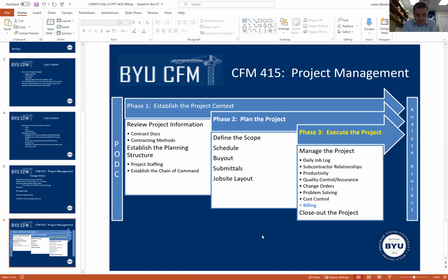if construction ends up shutting down for very long. And so during contract negotiations or your pre-construction meeting, you need to discuss the pay application process with the contractor and architect and the owner. Everybody needs to be involved in that. And so it's important that all three parties understand how that process is going to work so that you're getting people paid in a timely manner.